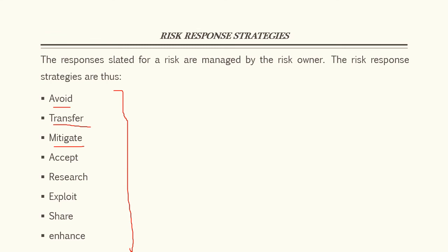To accept, normally we accept risks that are of low likelihood and low impact of occurring. Some of these risks, you just manage them. You do not take any drastic measures to curb this kind of risk. So you accept them and then you allow the project to go on. But when accepting risk, you should be mindful. You should always try to keep monitoring that risk because, as I said, some risk can migrate.